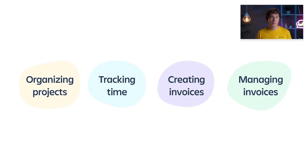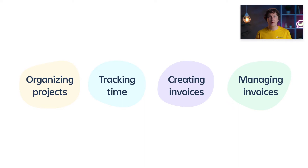Let's look at the common invoicing process. Everything starts with organizing Jira projects so that you can effectively work with logged time. Next you need to have time tracking that will guarantee that nobody will miss any team time. The next step is to build invoices from team hours and most likely export them to your accounting system. After invoices are billed, we need to manage them, send to clients, track their status, etc. So let's go through each step and talk about its best practices.